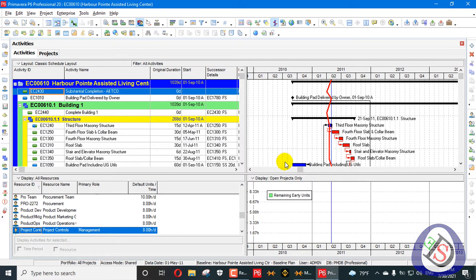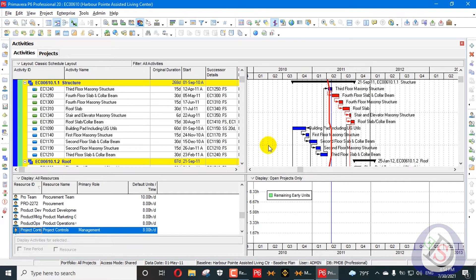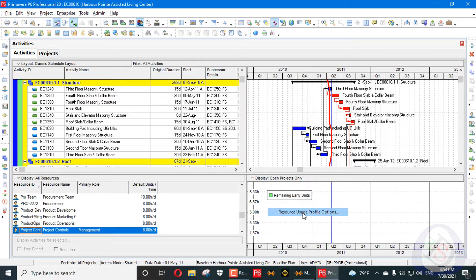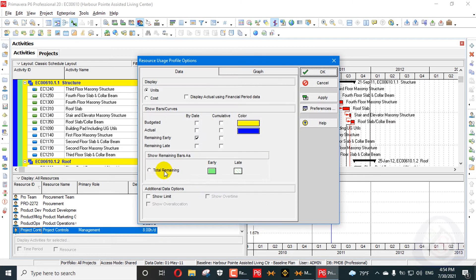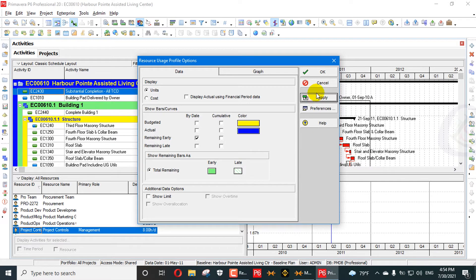In the resource usage profile, click on total remaining units. In this table, you only need to enter remaining early units here and then click Apply.